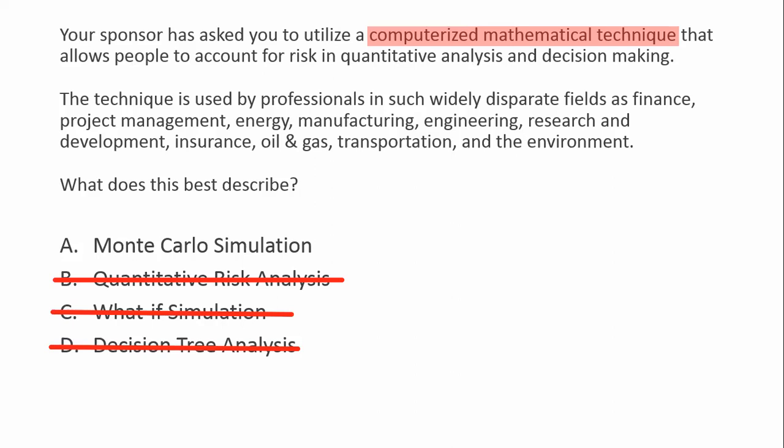It reads, simulation models the combined effect of individual project risks and other sources of uncertainty to evaluate their potential impact, that is, on achieving project objectives. The most common simulation technique is Monte Carlo analysis, in which risks and other sources of uncertainty are used to calculate possible schedule outcomes for the total project.